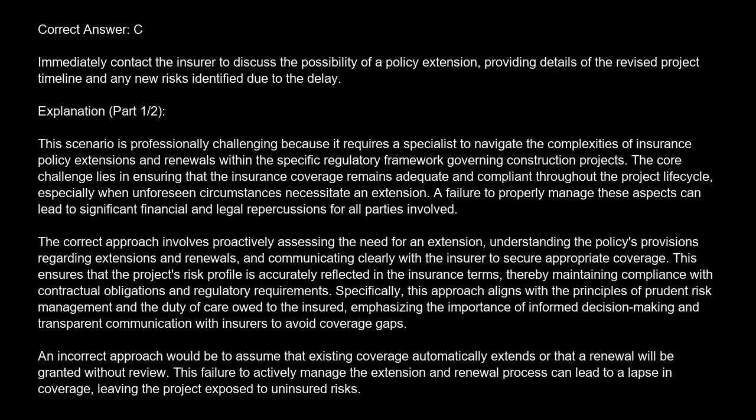and regulatory requirements. Specifically, this approach aligns with the principles of prudent risk management and the duty of care owed to the insured, emphasizing the importance of informed decision-making and transparent communication with insurers to avoid coverage gaps. An incorrect approach would be to assume that existing coverage automatically extends or that a renewal will be granted without review. This failure to actively manage the extension and renewal process can lead to a lapse in coverage, leaving the project exposed to uninsured risks.